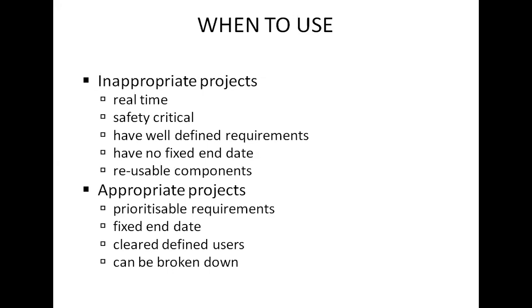When the aim is to deliver a working system to the organization in a short period of time, we use DSDM. A typical DSDM project delivers an operational system within 6 months. Another need for DSDM is that it gets people to work together in such a way that business goals are profitably accomplished, and it focuses on the current requirements.